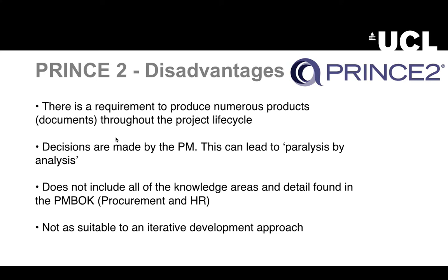But we can also identify some disadvantages of PRINCE2. The first one is connected with the requirement of a high number of documents throughout the project lifecycle. The second is that the decisions are mainly made by the project managers, so sometimes this can lead to paralysis by analysis.